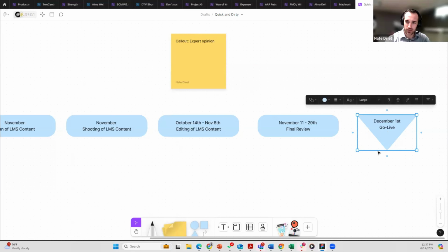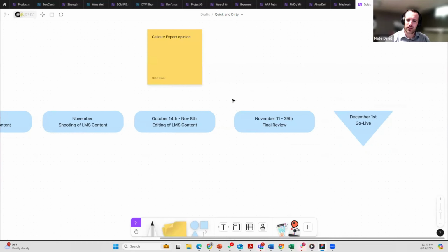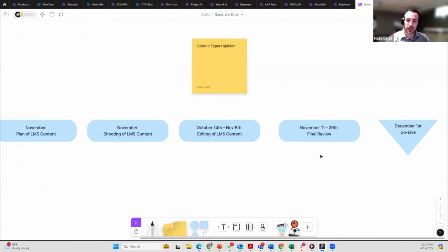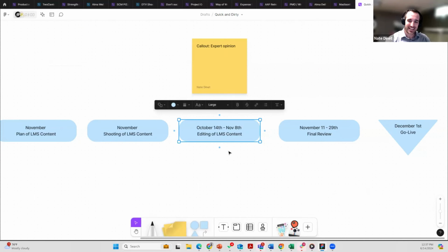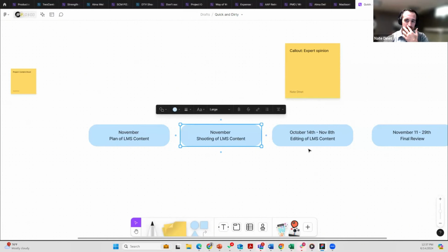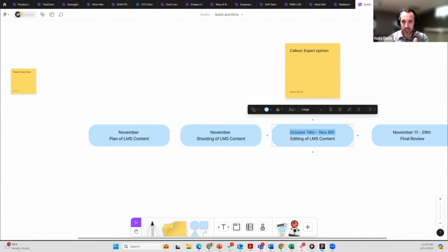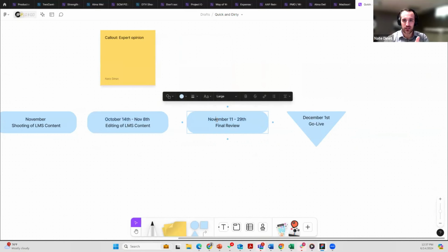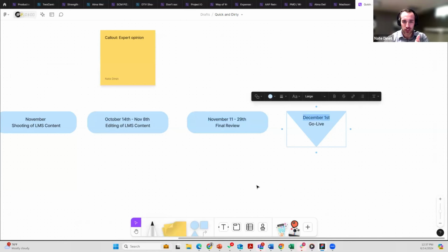So we have December 31st or December 1st as our go live date. We have November 11th through the 29th as our final review timeline. Then we have the editing of the content that's going to take place through October and November. So now, okay, we need to have our content shot and ready by the 14th so that we can make our November 11th final review and December 1st go live.